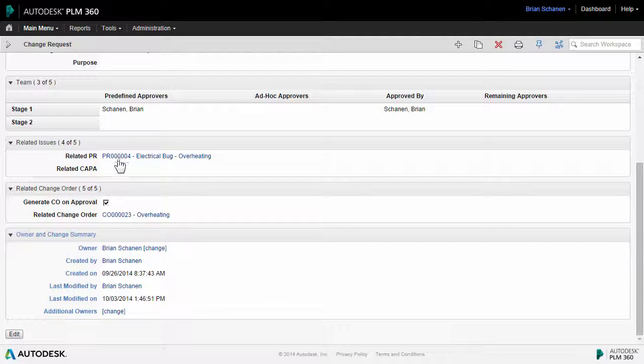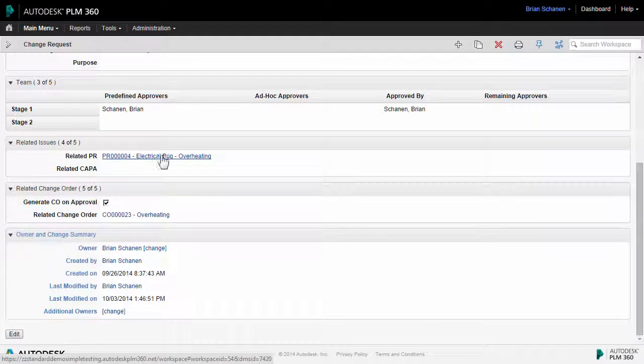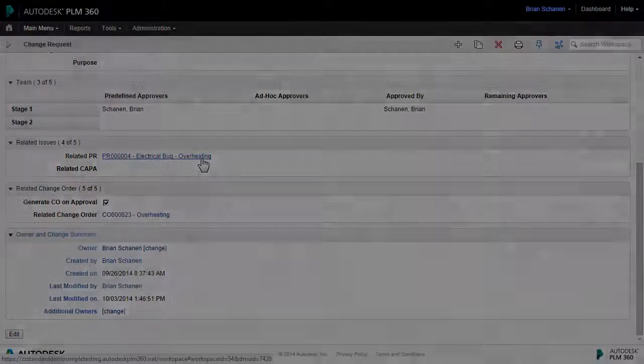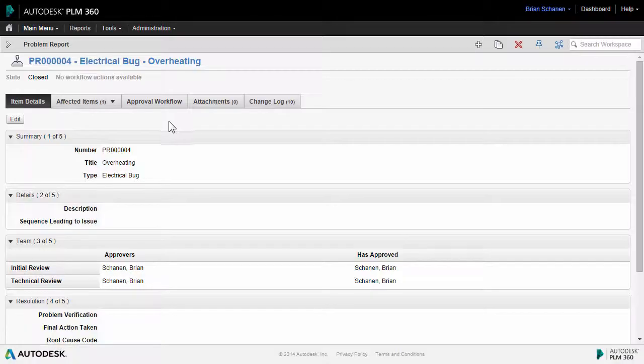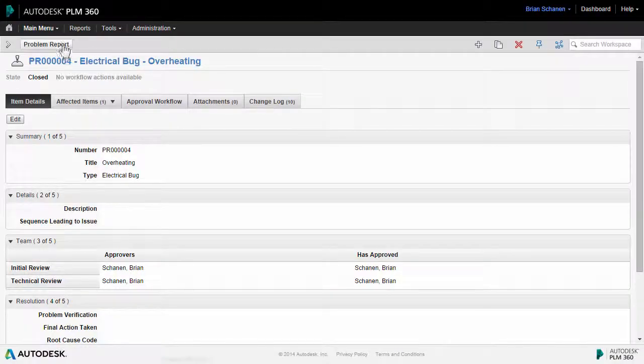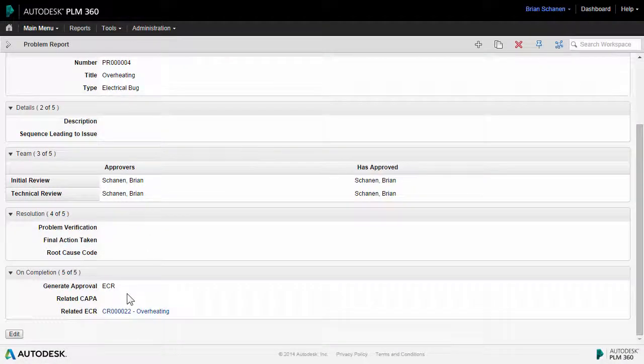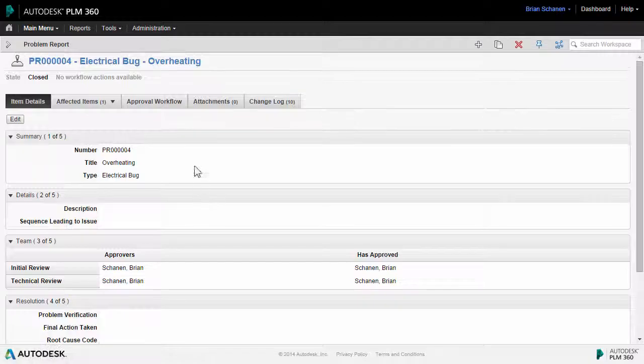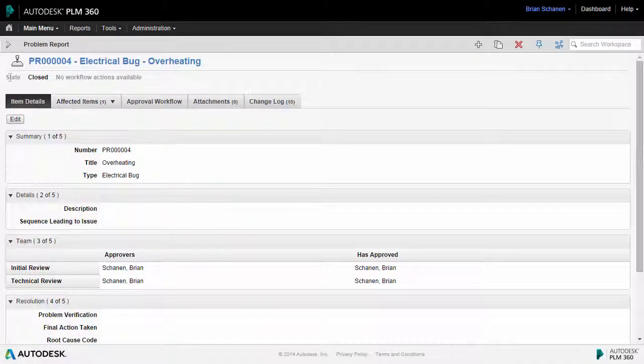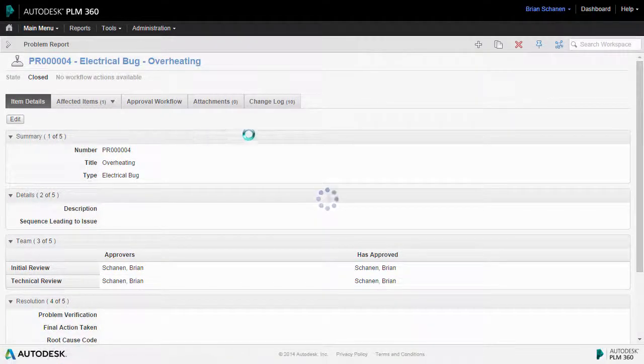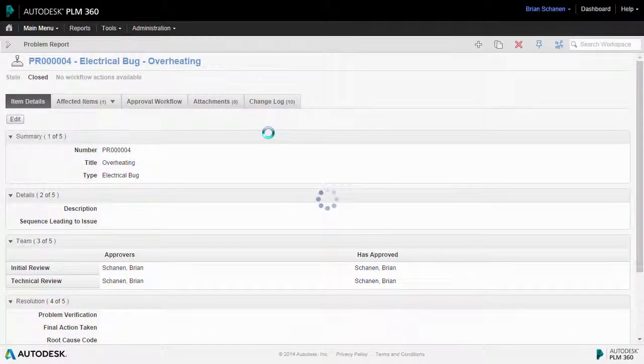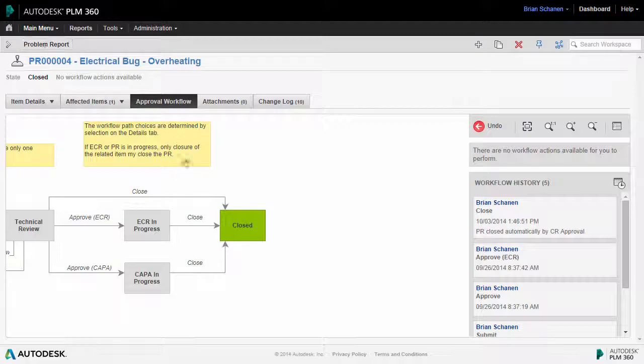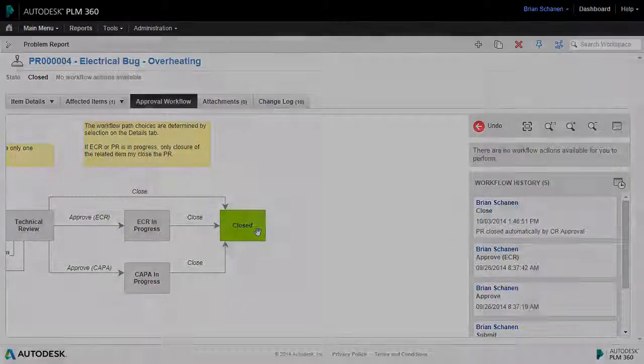But before we go there, let's take a look at the problem report that this was spawned from or created from. Back here inside of the problem report, which was the beginning of that engineering change request, we see that the workflow state is now closed. The act of changing that change request retroactively came back and closed out and advanced the workflow on this problem report to a closed state.